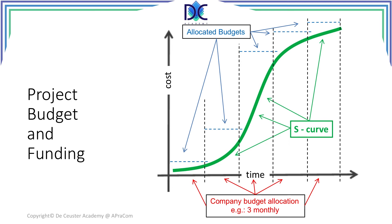The allocated budgets represent the money you have available to do the work, and as long as you don't exceed that amount you can continue working on your project. You can see that everywhere there is a little bit of reserve included. It also depends on your company — sometimes you don't have any reserve. Budgeting can also take into account your earned value parameters; the CFO can use EV parameters to adjust your budget.